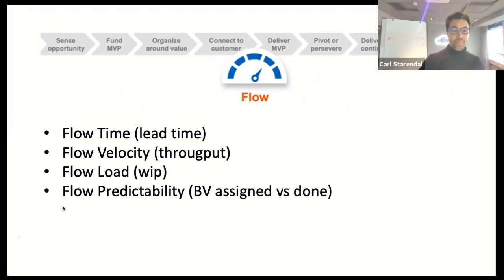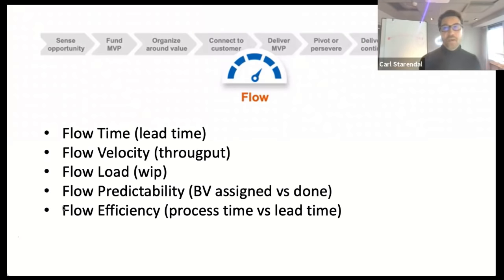But I might now also introduce flow efficiency. Again, terminology from the flow framework. I'm referencing here actually doing value stream mapping. I'm looking for the times in how long is a feature in a specific state. How long were we actually working on building the code, for example? And how long time did it wait before someone started coding for it?